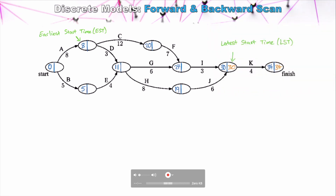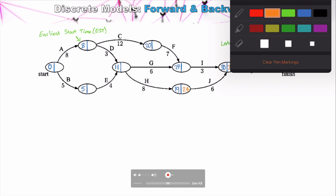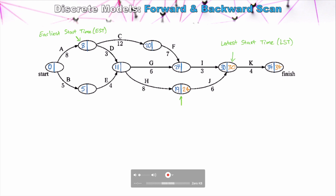As we work backwards, there are important things to be aware of. For Task J: we can start it as early as 19 units, but we need to complete it by 30 units to not delay the project. Task J takes six units, so we need to start it no later than 24 units. This means Tasks J and H have slack time — we could delay these tasks by a total of five units without delaying the entire project. Task J clearly has five units of slack time with no overall effect on the earliest project finishing time.